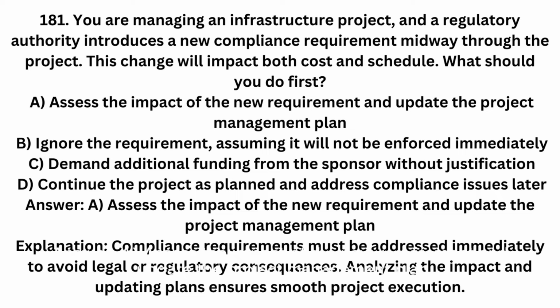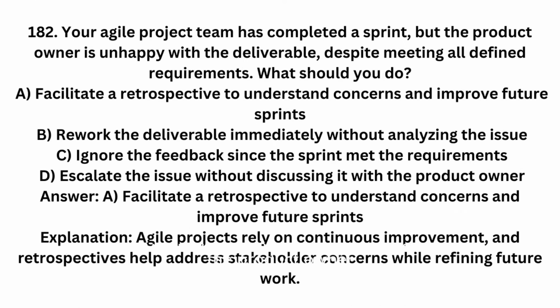Answer: assess the impact of the new requirement and update the project management plan. Explanation: compliance requirements must be addressed immediately to avoid legal or regulatory consequences. Analyzing the impact and updating plans ensures smooth project execution.